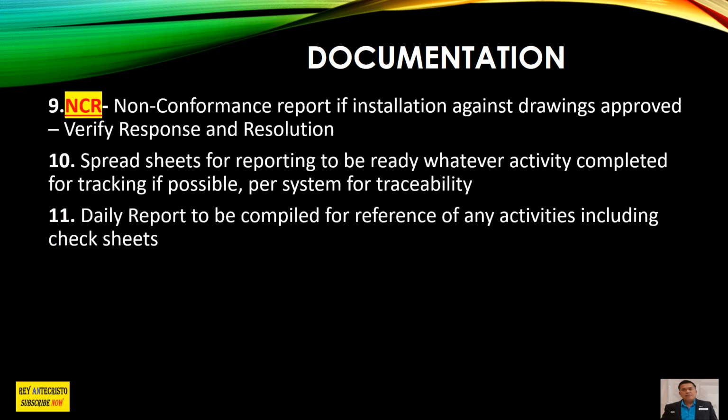Then number 11, daily report to be compiled for reference for any activities, including check sheets. So there is documentation. That's why in every project we have a document control. They are the ones attending to all this documentation. It will be compiled and put in the archive, or on any hard disk for download. That's the time when we have any verification, we can easily verify and check based on their transmittal, their sequence, and their documentation procedure.